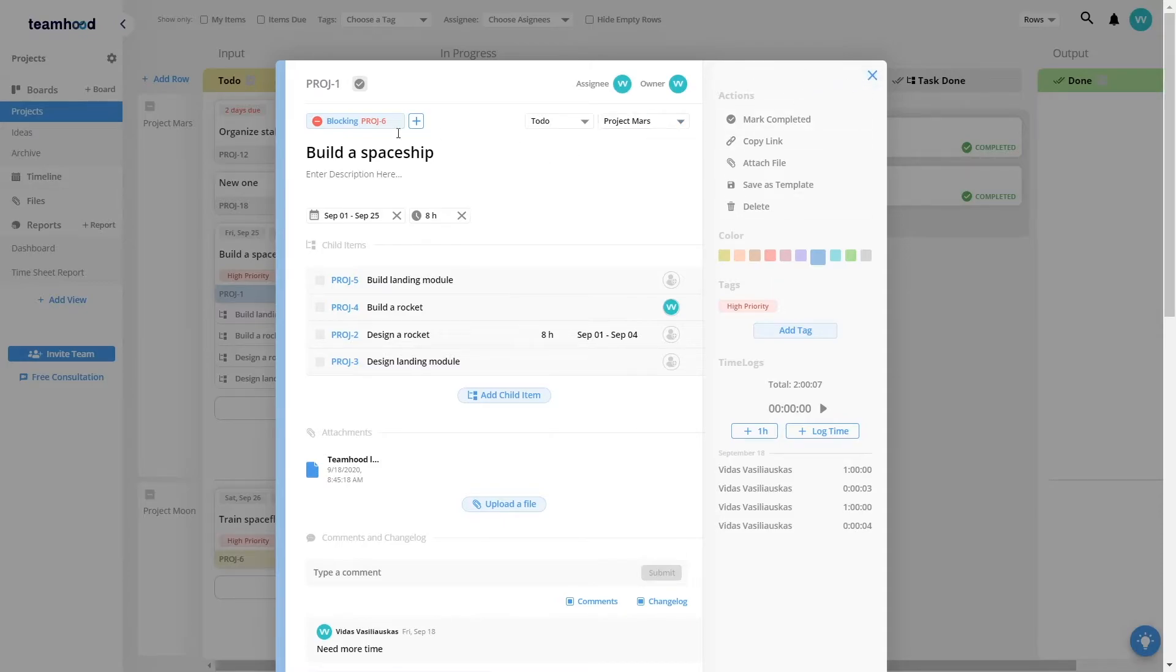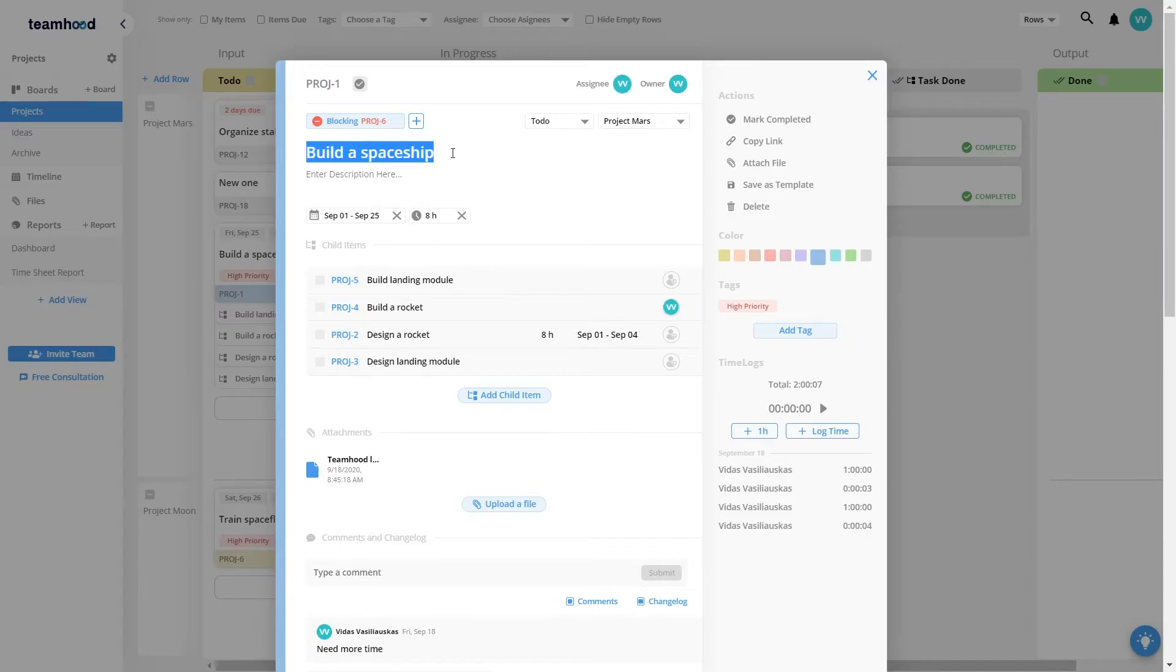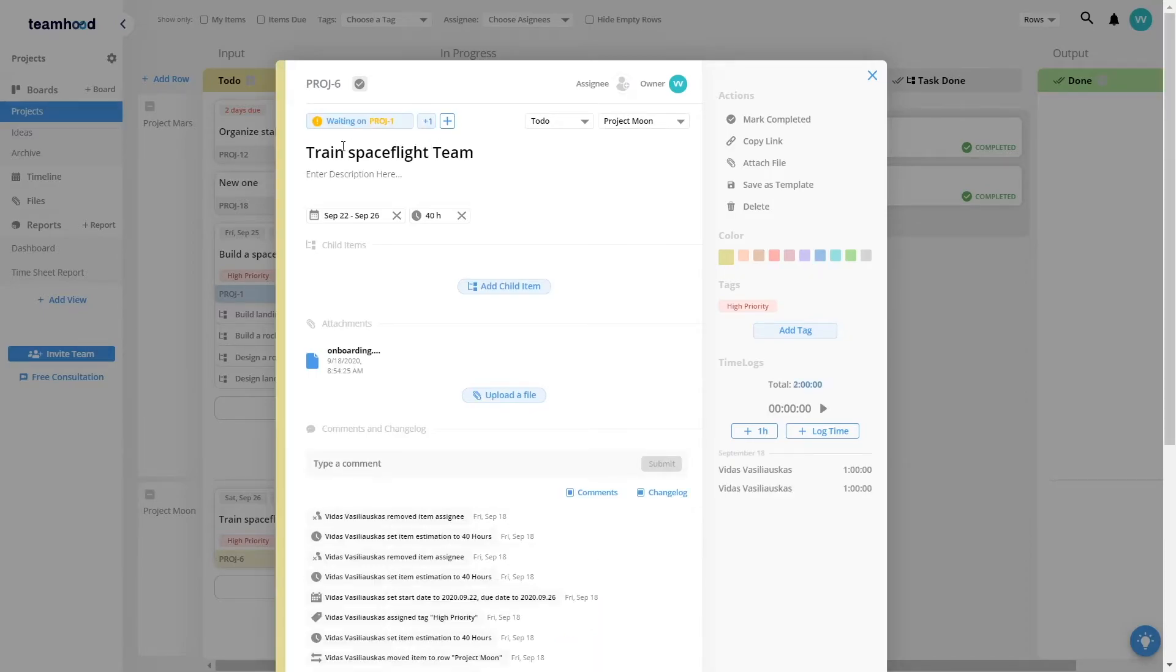Each work item can also have dependencies. As we've seen here, this work item is blocking further work and this Train Spaceflight Team depends on that item. When it gets finished, this one can be started.